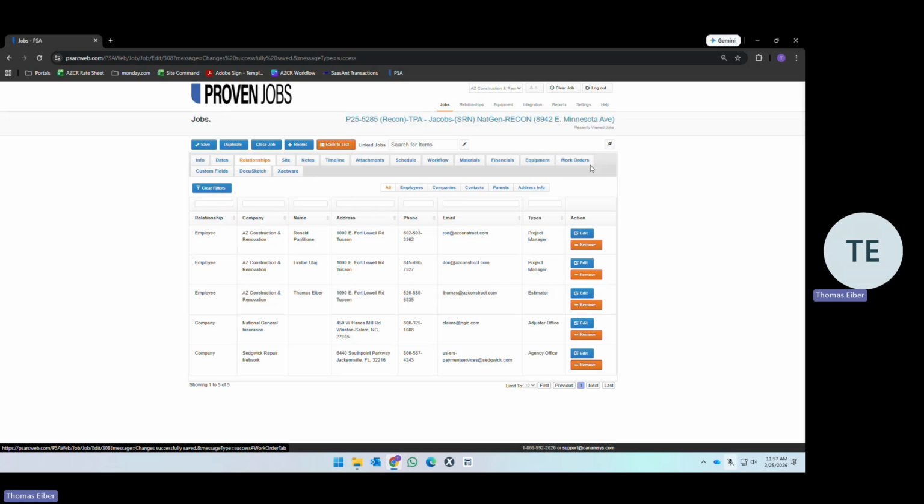You'll also be receiving Outlook calendar invites, so that will be a method of communication as well. When and how to escalate and to who. So the internal operations manager is who you're escalating any major delays or changes to. Anything that happens with the client or anything that happens that's out of our control, in our control, doesn't matter. You escalate to operations and they will handle it appropriately. If it needs to go to ownership or to another entity within the company, let them handle that. You're just providing the details of what happened.